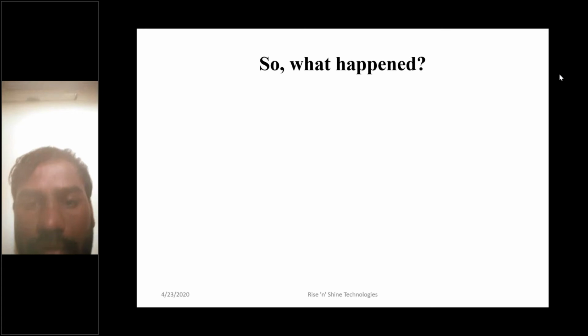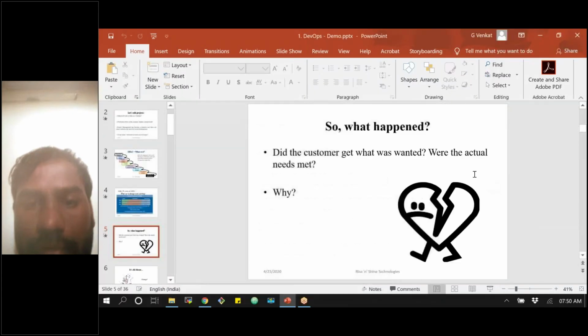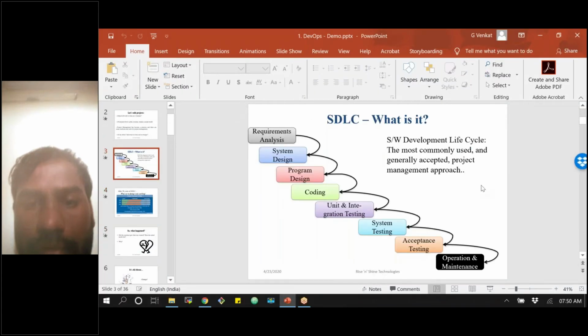Yes, what has happened? Why are these delays happening? If you observe this process, one important thing is that the client is involved only in the initial requirements phase, and then he comes back to be involved in the acceptance testing environment.